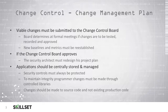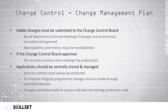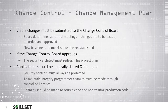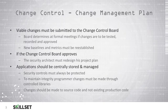The changes must be submitted to the change control board, who is responsible for determining at a formal meeting whether or not the change should be tested, recorded, and approved. They also need to establish new baselines and metrics. If the change control board approves the change, the security architect will have to redesign the project plan. Applications should be centrally stored and managed, and security controls must always be protected.